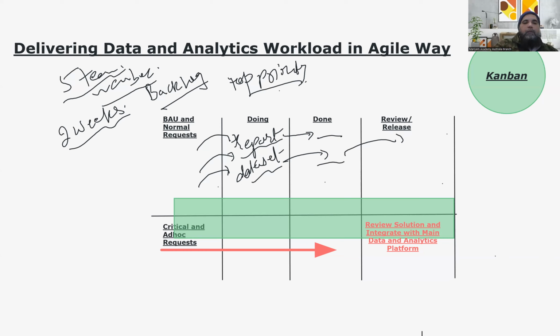Out of 2 weeks, each resource has, for example, 37 and 37. Normally we have a 37-hour week, so let me say 70 hours per person, one team member. And then we have 5, so 5 times 70 gives us 350 hours. So now, 350 hours of work has been divided between the team for 2 weeks.